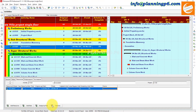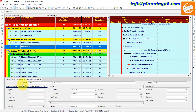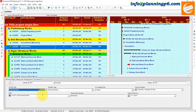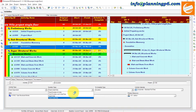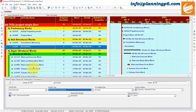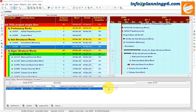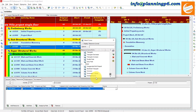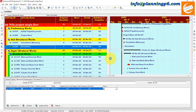Now we are going to assign the curve. The activity duration type must be Fixed — go to Activity Type: Task Dependent, Fixed. Now go to Resources and check your curve. You can assign from the default or select your Example Curve and assign it to this specific resource.